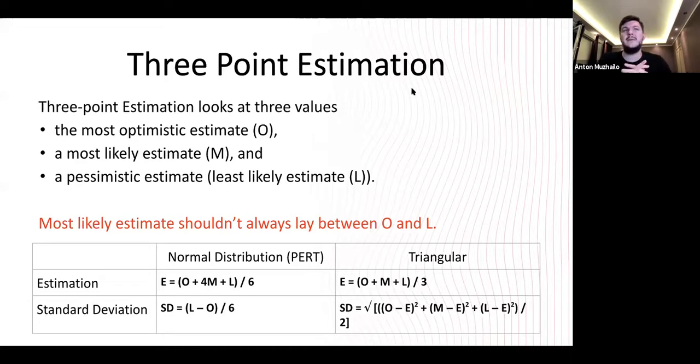So once you're saying, okay, the estimate is 10 plus or minus 2, plus or minus 2 is the standard deviation. It is what can deviate from the middle number, plus or minus. And this standard deviation can be calculated with a formula. So this is not like when you say, okay, we estimate, let's say, 10 days plus 25%. Why 25%? Because, well, I always pick 25% for any task, any project, any team, any constraints. This is a very rough estimate, to put similar numbers each time. Better to calculate it.